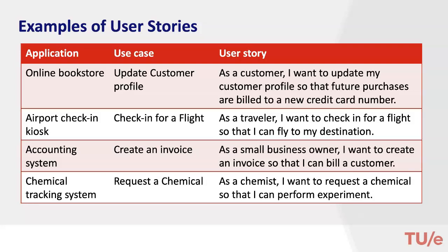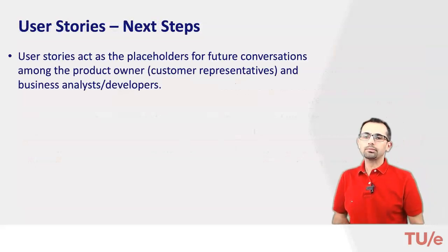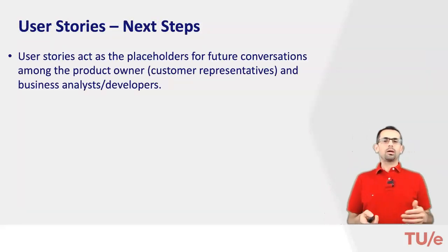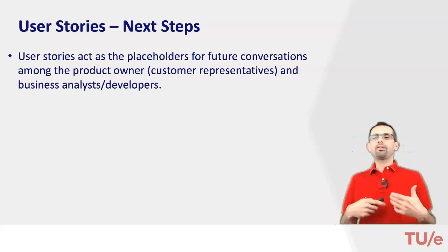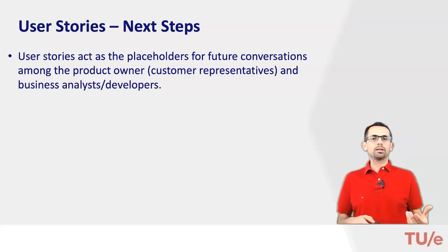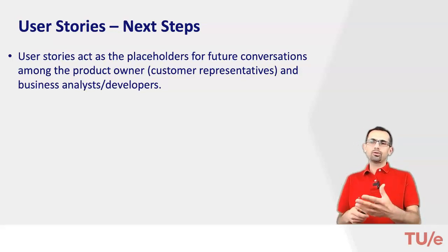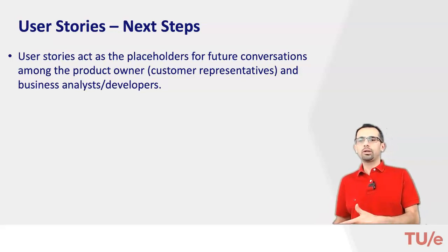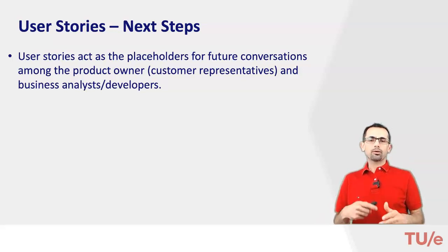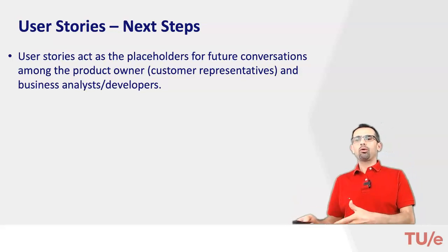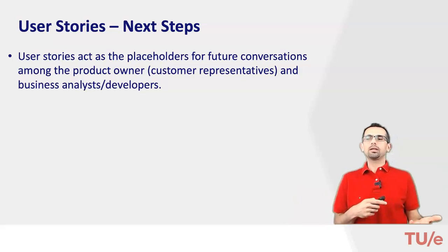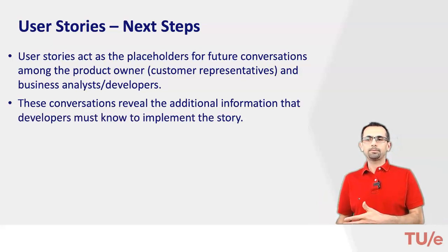And the question is, so what? So you have these user stories. What are the next steps for these user stories? Not much, I must say. Not much in the sense that you don't define too many details about each user story. They mainly act as placeholders for future communications among the product owner, which are customer representatives, and business analysts and developers.